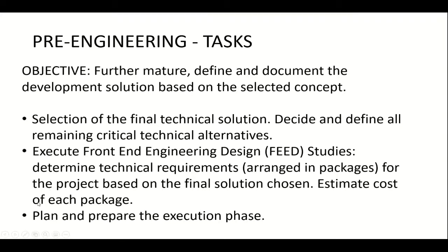Okay, and then here usually the technical requirements are arranged in packages. So I make a package, and then these are technical requirements that the company later sends to the contractors, to engineering companies, so that they can come up with offers depending on the requirements. You estimate the cost again of each package and plan and prepare for the execution phase.